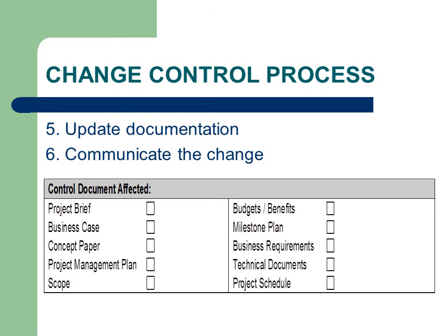The key documentation, such as budget, schedule, risk register, and any other technical documentation, must also be updated and communicated. A sample change request template is included in the template library on Chase Online.